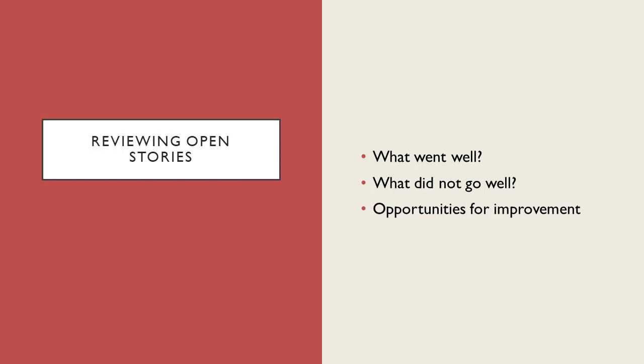On the flip side of that, you want to review what didn't get closed. Oftentimes, stories aren't completed within the sprint, again because of a blocker, because of a reprioritization, or maybe there are just not enough resources to go around in terms of person hours. So reviewing those stories that didn't get closed and covering what went well and what didn't go well are absolutely pieces that you want to include in the sprint review.